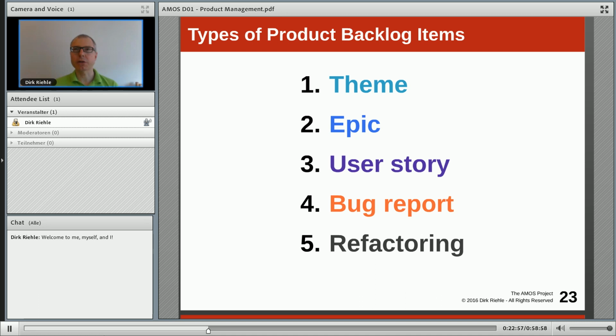Estimation is an important part of Scrum, and without a clean code base, any of your guesses as to estimations, planning poker, as to how long it will take you to implement a user story are moot, because you might run into a bug and another bug, and without refactorings, it will all be so bad that any of your estimations will just be way off, meaning you will not be able to pick up a consistent development speed, and without consistent development speed, you will not be able to plan a release nor deliver on a roadmap as promised to a customer.